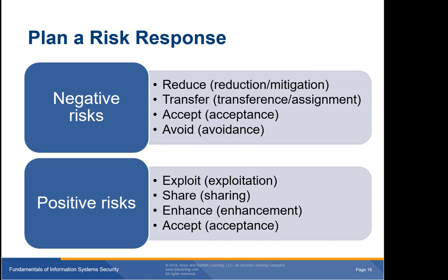Now, let's drop down to positive risk. For positive risk, you can exploit, share, enhance, or accept each risk. Let's look at exploitation first. When you exploit a positive risk, you take advantage of an opportunity that arises when you respond to that risk. For example, suppose your organization developed training materials for use within your organization to help you address a specific risk. You might exploit the risk by packaging and marketing those training materials to other organizations.